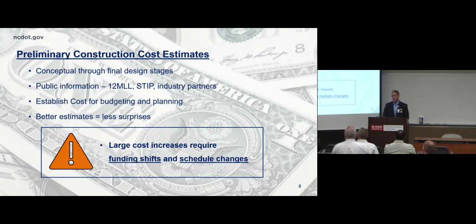One thing to note here is that when you have large cost increases on projects, either between estimates or as a project gets close to final turn-in and final quantities, those increases may require funding shifts and/or schedule changes that could impact other projects in the program. So it's important to get these estimates as accurate as we can at every design stage as the project is being designed. That will allow us to continue to deliver our projects on time and within budget.